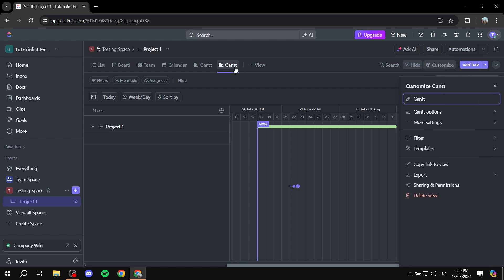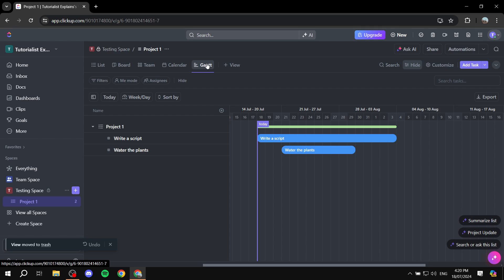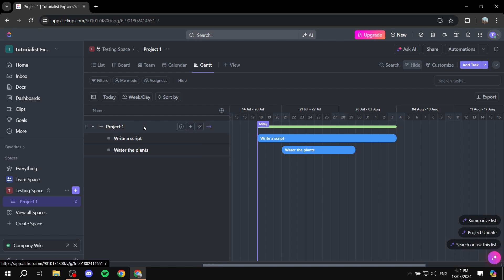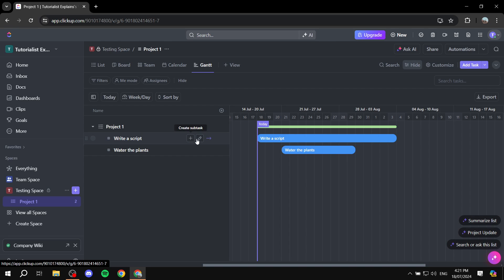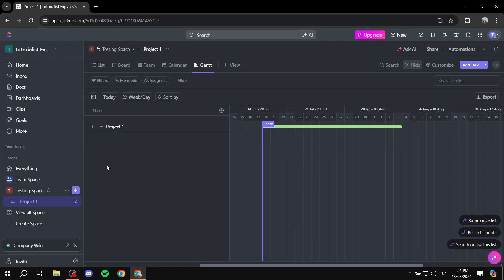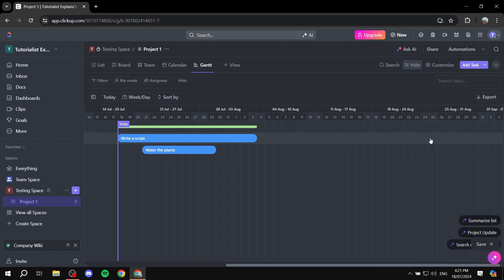Open up the Gantt view and you can already see how different it is from the board view and list view. On the left panel, you can see a few toggles. You can see the projects that you have — I have project one — and it's going to show you the tasks related to this project. You can create subtasks within them, rename them, or go to a task which takes you to where it sits on the Gantt view. You can also minimize or completely hide this task table to have more space for the actual view.